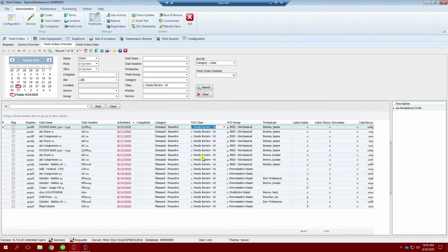and I can systematically go through each one of these and see, okay, do I have the parts? Do I have the machine availability? Do I have the labor? If I have my labor estimates over here, I can calculate the total sum of the work that's going to take and see if I have enough labor time based on my technicians, mechanics, vendors availability.